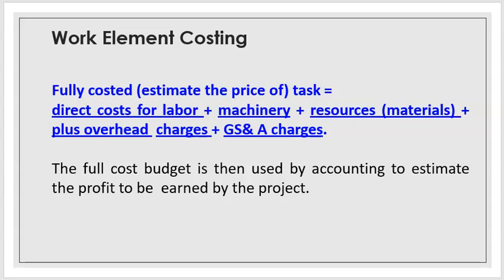GSA may be charged as a percentage of direct costs, all direct and indirect costs, or on other bases including total time to completion.